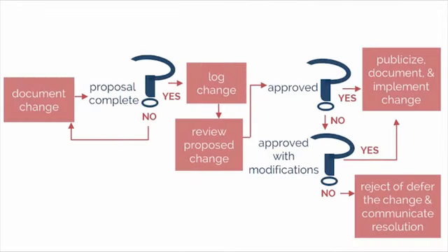The Perform Integrated Change Control process is conducted from project inception through project completion. There are a few things to remember here about how change should be handled. If it is a small change, the project manager will need to document it, get a sign-off from the customer, and then approve the change. If there is a major change that could significantly impact the project, the project manager should go through the entire Perform Integrated Change Control process. Whether a small or large change, control is never an informal, but always a formal process with proper documentation required for approving changes.